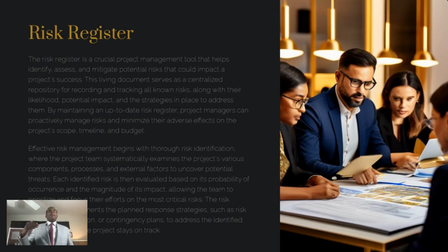For me, I normally look at my risk register, if not every day, every other day, but most of the time it's every day, just to check with the people that own those particular risks. Hey, is there anything going on, anything that's changed? Sometimes they could get irritated with me, but I have to do my job. And doing my job is making sure none of these risks get flipped to an issue. And if they do flip to an issue, then I should have already been ready as the project manager, as well as the person that's responsible for it. So a risk register is basically a log in which you are being proactive versus reactive.